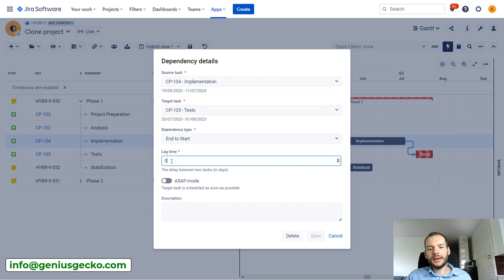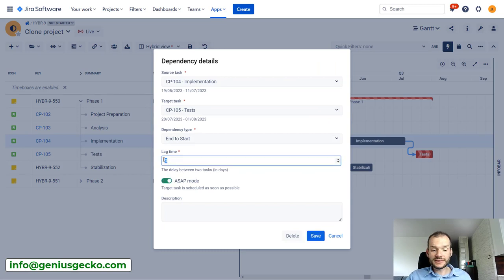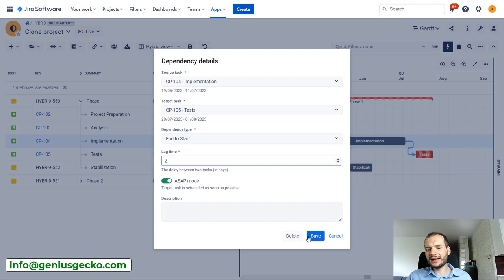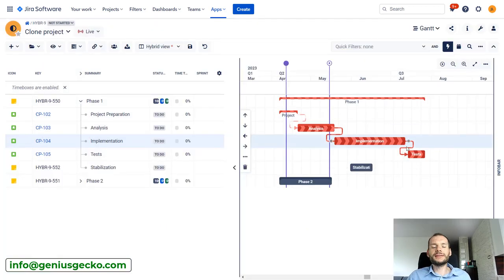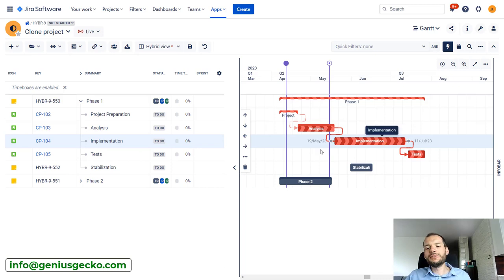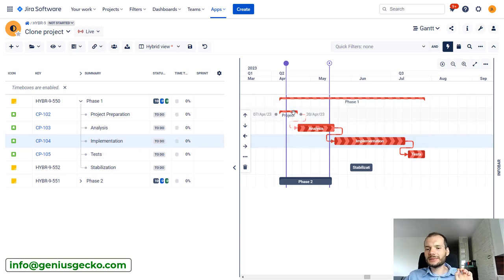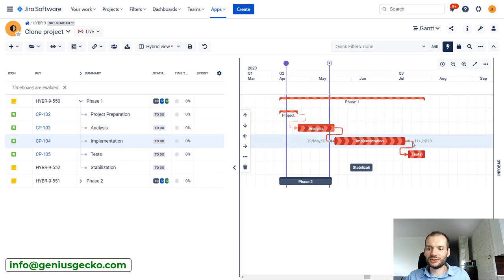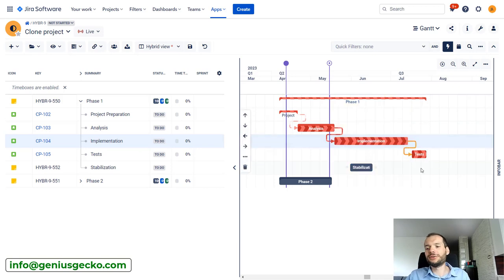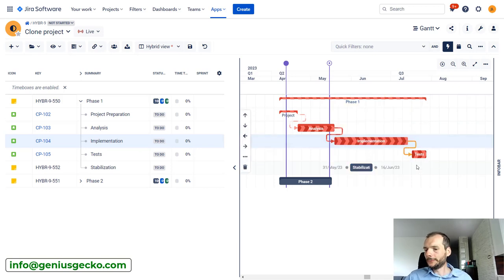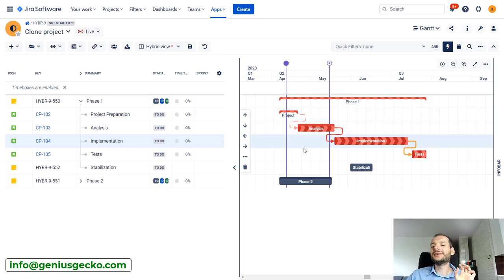Okay, this is if we disable ASAP mode. If we have some lag time, the task will still be on critical path. So despite the fact there is two days of gap between those tasks, the previous tasks are still marked as being on critical path. And that is because this two-day delay, this two-day lag time, is always maintained. So there is no buffer time between those two tasks. So this was the first use case.